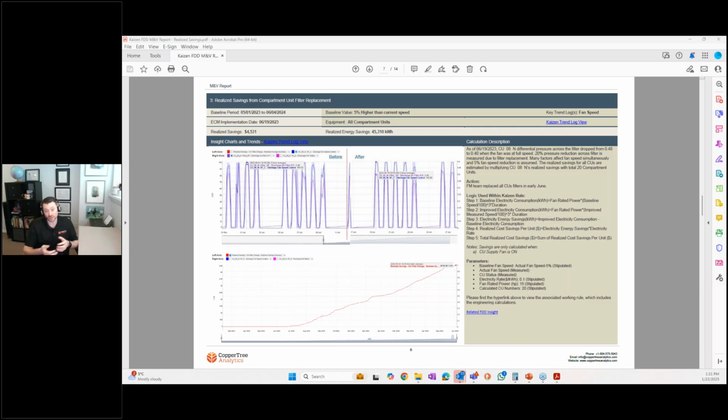We join the commissioning meetings a lot of times so that we're present and we know the schedule and what groups of systems are being tested at what time. Some projects, of course, come online all at once. Other very large ones might take several months to work their way through commissioning, and even be occupied in phases. I can think of a couple of smart hospitals we've done where entire portions of the building are occupied and they're still finishing up the rest of it.